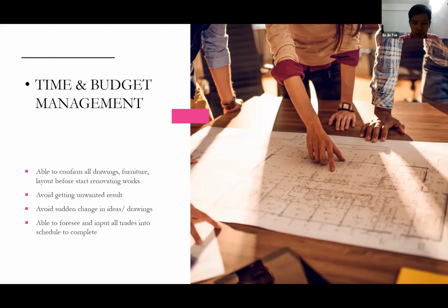Then after that, if the owner comes and has a look during the renovating works, sometimes they will say they don't like this design, or maybe this wall they want to hack out additionally. These are all double jobs in our renovating terms. And we would categorize these as wasting time or wasting budget drag-on factors. So having an ID will be able to minimize all these risks.